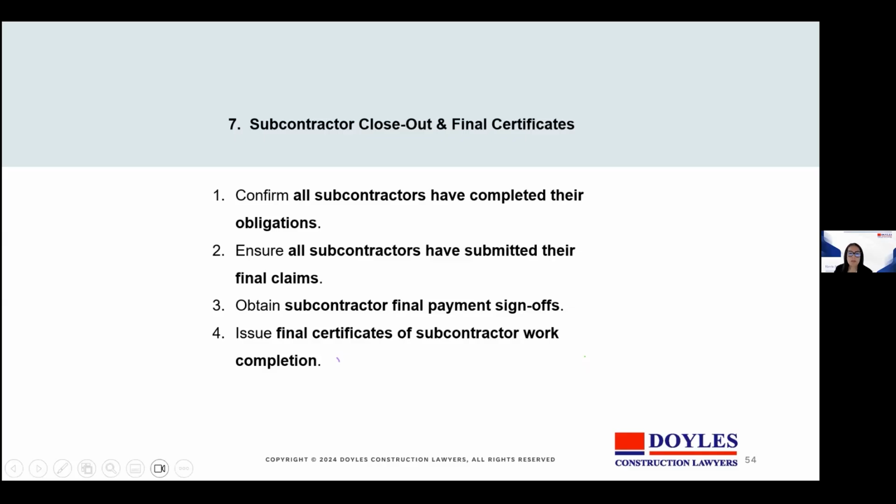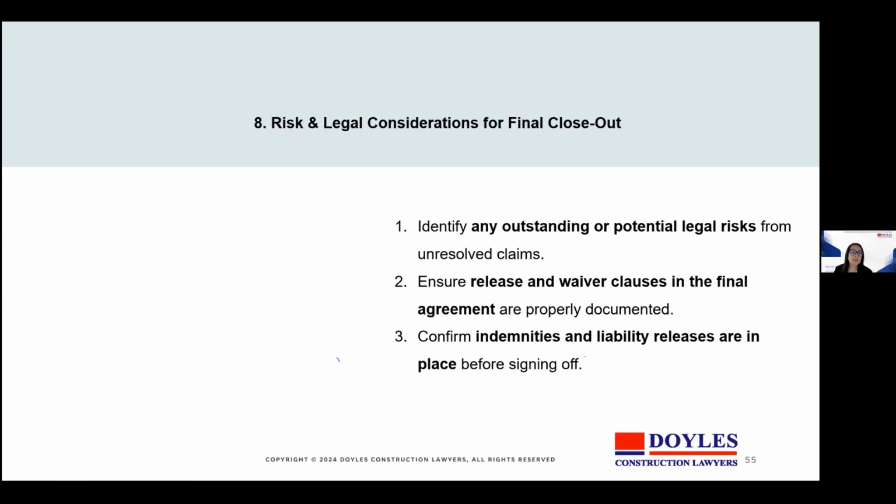So what are the risks and legal considerations for final closeout? The point here is that final releases and waivers must be properly documented. It's important to identify any outstanding or potential legal risks from unresolved claims. It's also important to ensure release and waiver clauses in the final agreement are properly documented, and that indemnities and liability releases are in place before signing off.